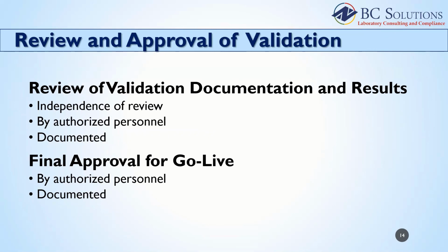The last individual element that should be part of your validation is the review and approval of all the validation documents generated during the process. The appropriate personnel performing the review are those people that you have already identified in your validation plan or policy. Ideally, to obtain independence of review, the personnel reviewing the documentation should not be the same people who implemented the validation scripts. It's always better to have a second pair of eyes reviewing the completed documentation.